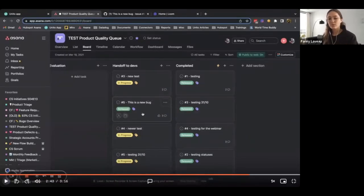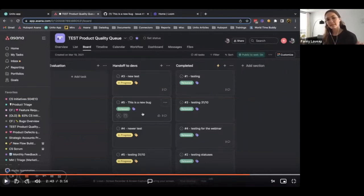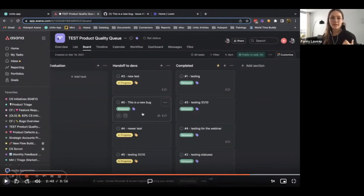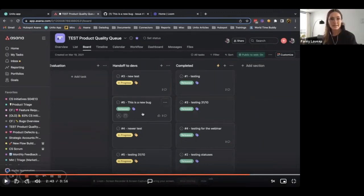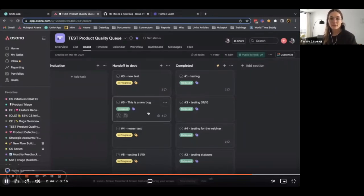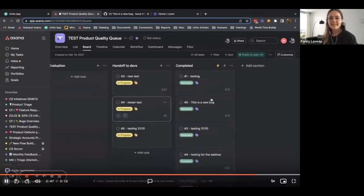And I could have set it up so that automatically my task in Asana goes to the completed column. That would make sense. But the way we do it at Unito is project managers would actually want to run a few tests before completing a task entirely because we want to make sure a fix is successful. So we're running this test and then we're moving the task manually to the completed column.